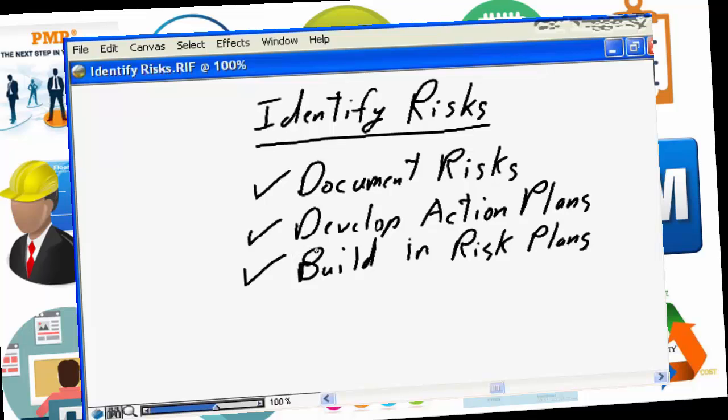If we need to add additional funds, the word we use in risk management is contingency, to deal with the possibility we may have to put additional training into our project. If we need to buy the insurance policy, pay the premium to our supplier to guarantee delivery of equipment, we build that into our project.